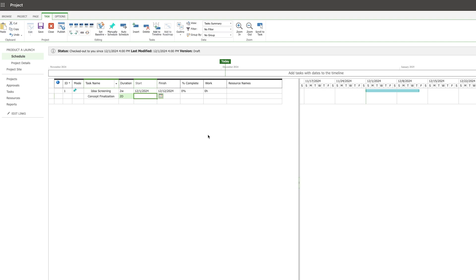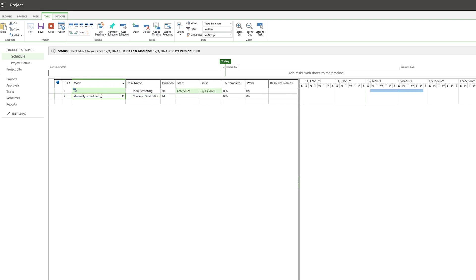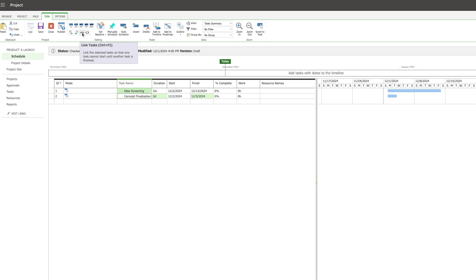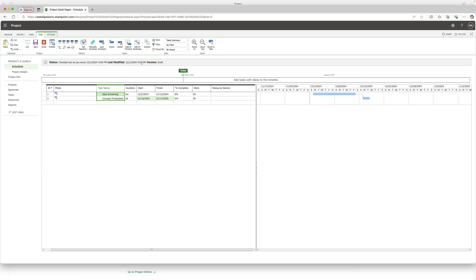I'll define a predecessor for Concept Finalization and set the schedule to auto-schedule, then provide the connection. In this way, tasks can be linked in Microsoft Project. Concept Finalization is set to take two days and can only start after Idea Screening completes. To apply this link, press Control, select both tasks, then click 'Link Task' from the top menu. You can also add tasks to the roadmap.